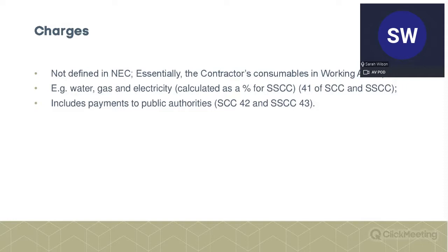The difficulty comes when you have loads and loads of small value compensation events, which then start to dwarf your fixed price. And I have seen this. I've seen contracts where the compensation events end up being an extra 50% and more of the actual contract price. So, if you get this percentage wrong, I guess, again, it can eat into your profit quite substantially. And the same point applies to a high value, really large compensation event.